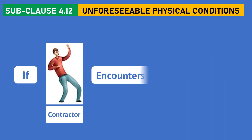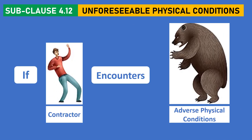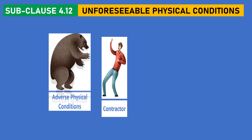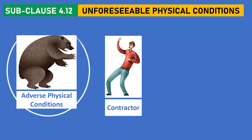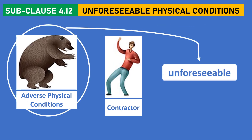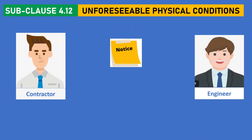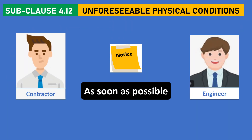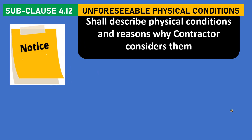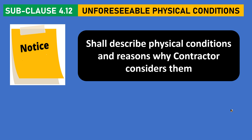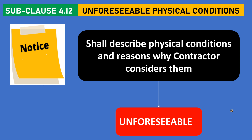If the contractor faces adverse physical conditions which are unforeseeable, the contractor shall provide notice to the engineer as soon as possible. The notice shall describe the physical conditions and the reasons why the contractor considers them unforeseeable.